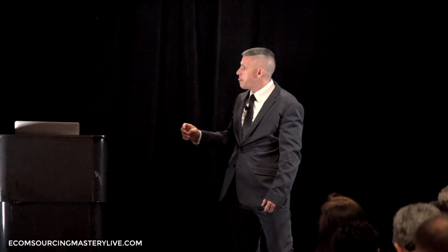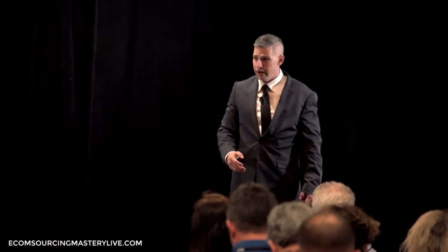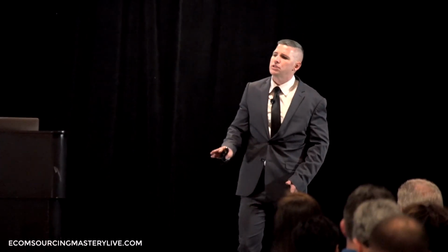First, how long does it take for your supplier to actually process the purchase order? After we put those products on a purchase order and we send it over to the supplier, how long does it take for them to actually process it? Some of them take like 1 day, some of them take a week, right? Okay. How long after they process it does it take for them to even ship it? They might process it, but still ship it 5 days later, right? You have to know your supplier. Every supplier has its own little nuances, okay?